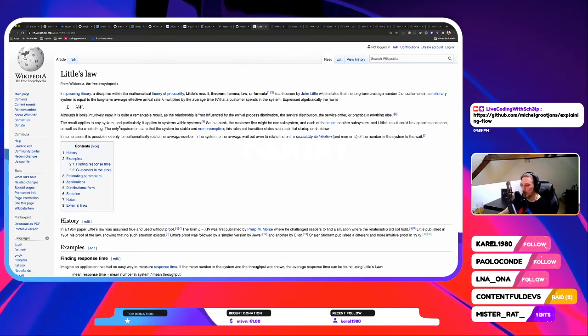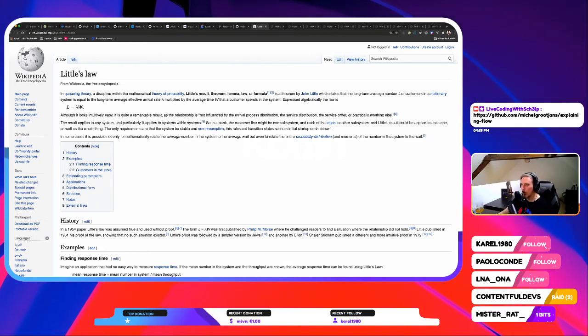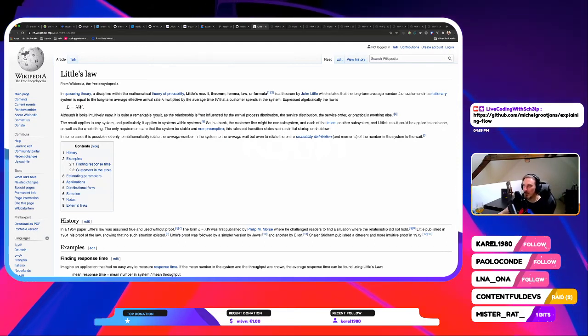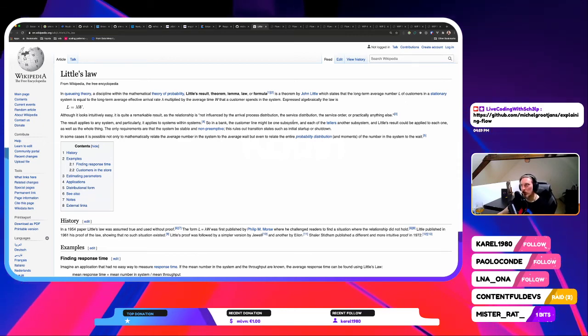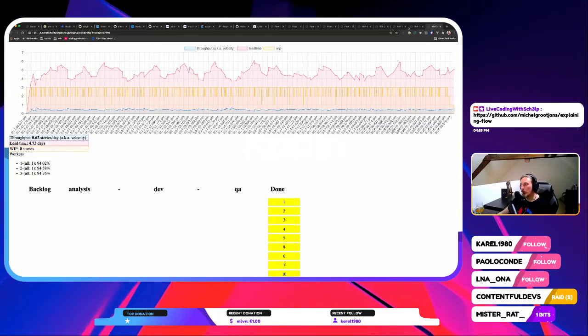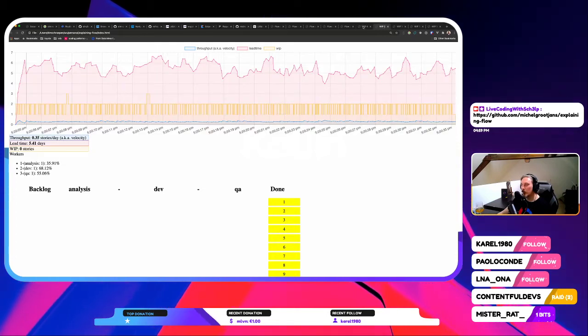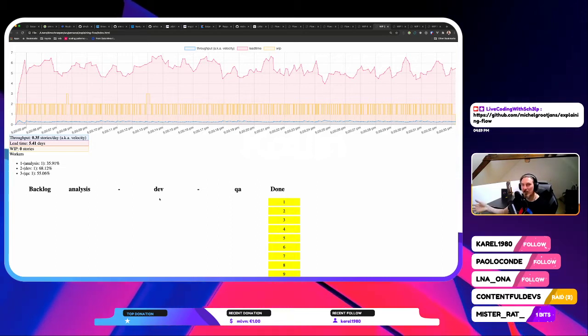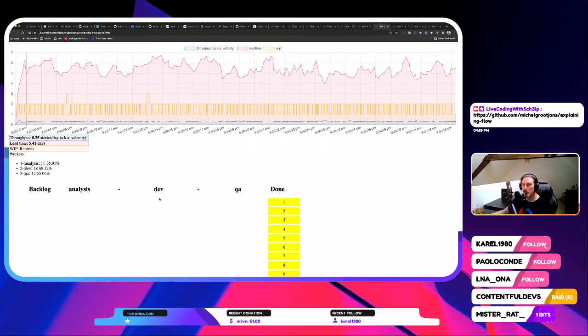Or you might do it short term. The other way you can play around with that is by modifying the W here, the lead time. I don't think you can actually do that, because lead time is a direct consequence of that thing. We saw that there was an inverse relationship between those things. But the one thing that you can more easily play with is the work in progress. So one thing that you can easily modify from today until the next day is by just decreasing your work in progress, and you will improve your lead time.